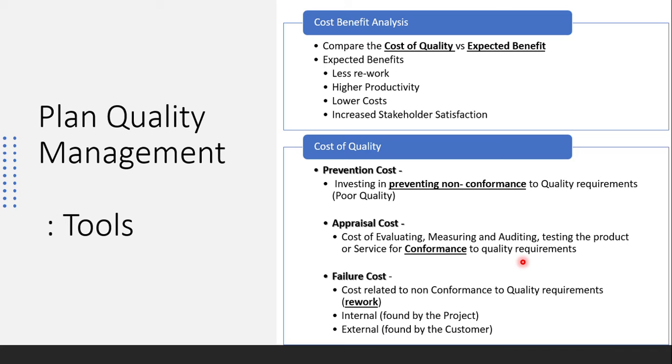They are adhering to the guidelines of the quality standards laid down by the software development management team. So the appraisal cost is basically the periodic auditing and evaluating to see whether your project team and the deliverables are conforming to the quality requirements.